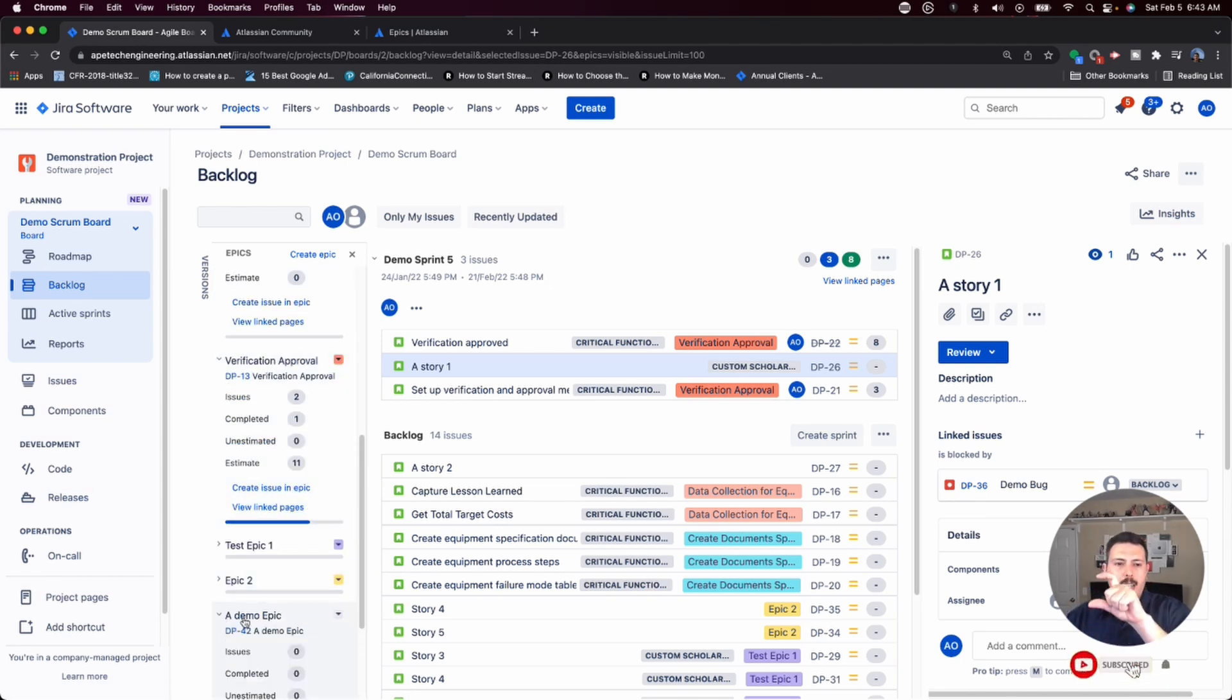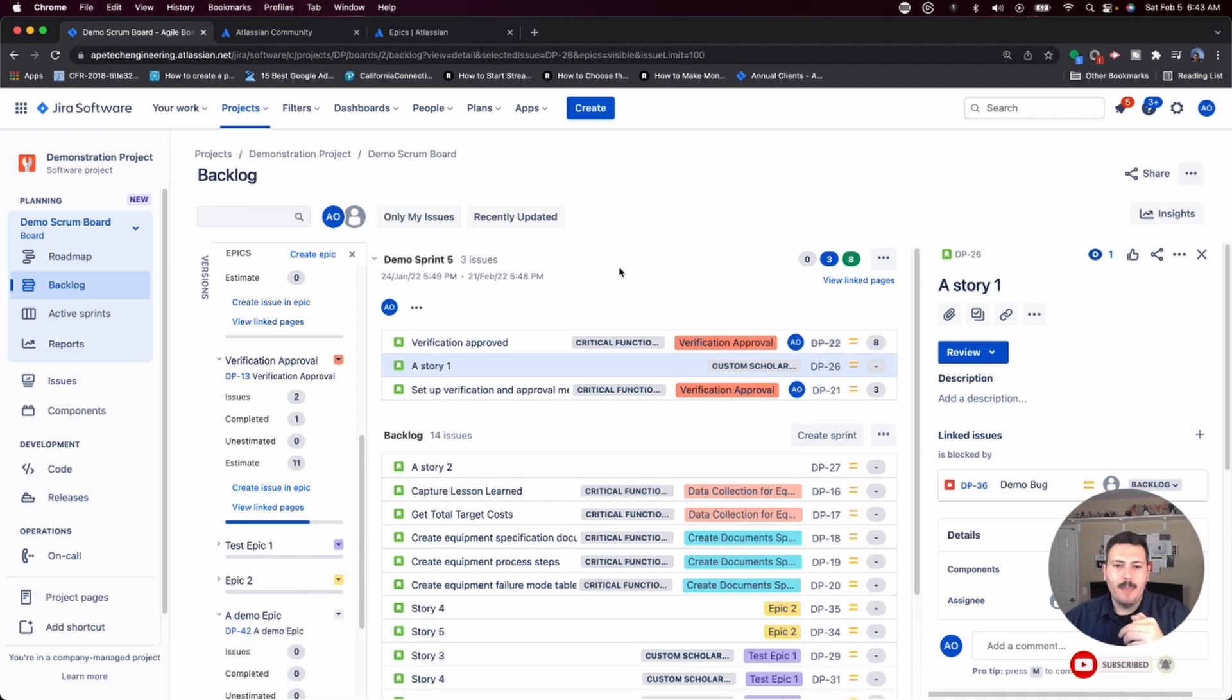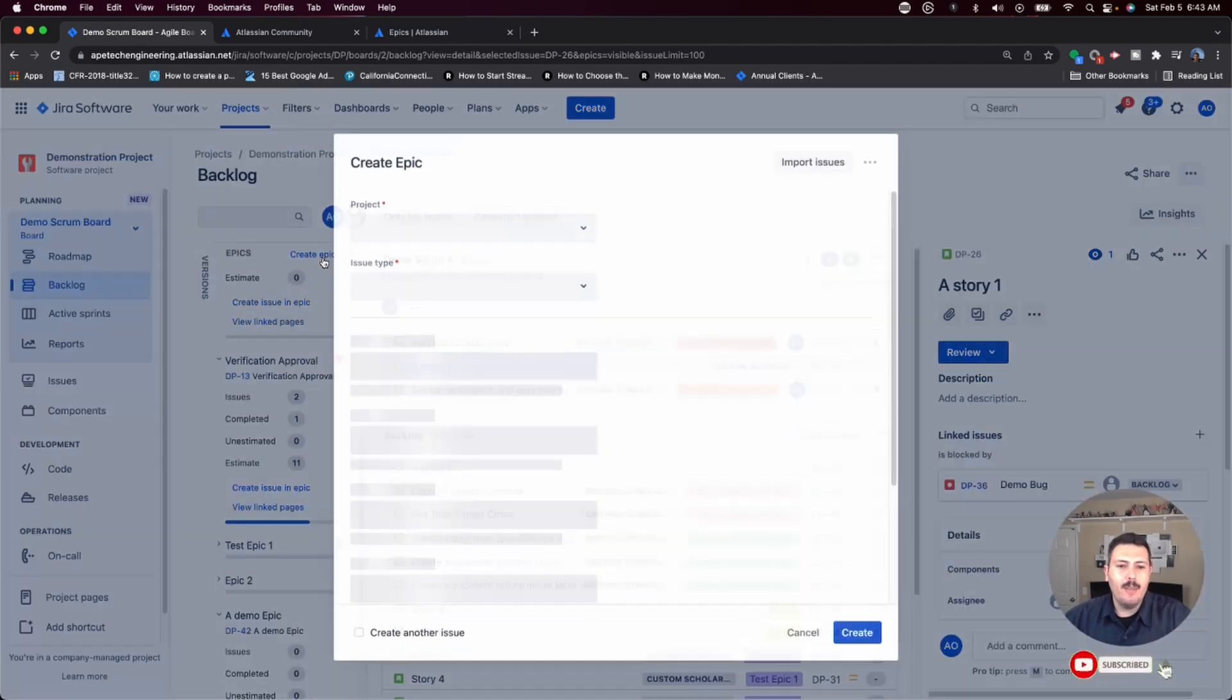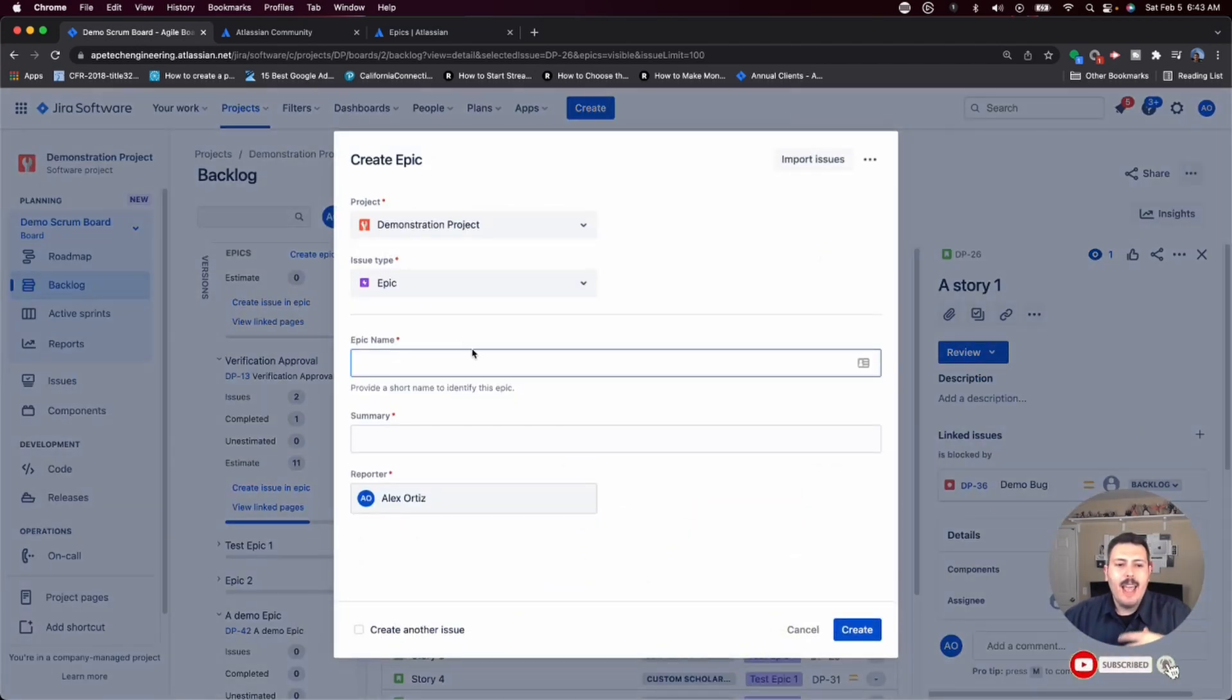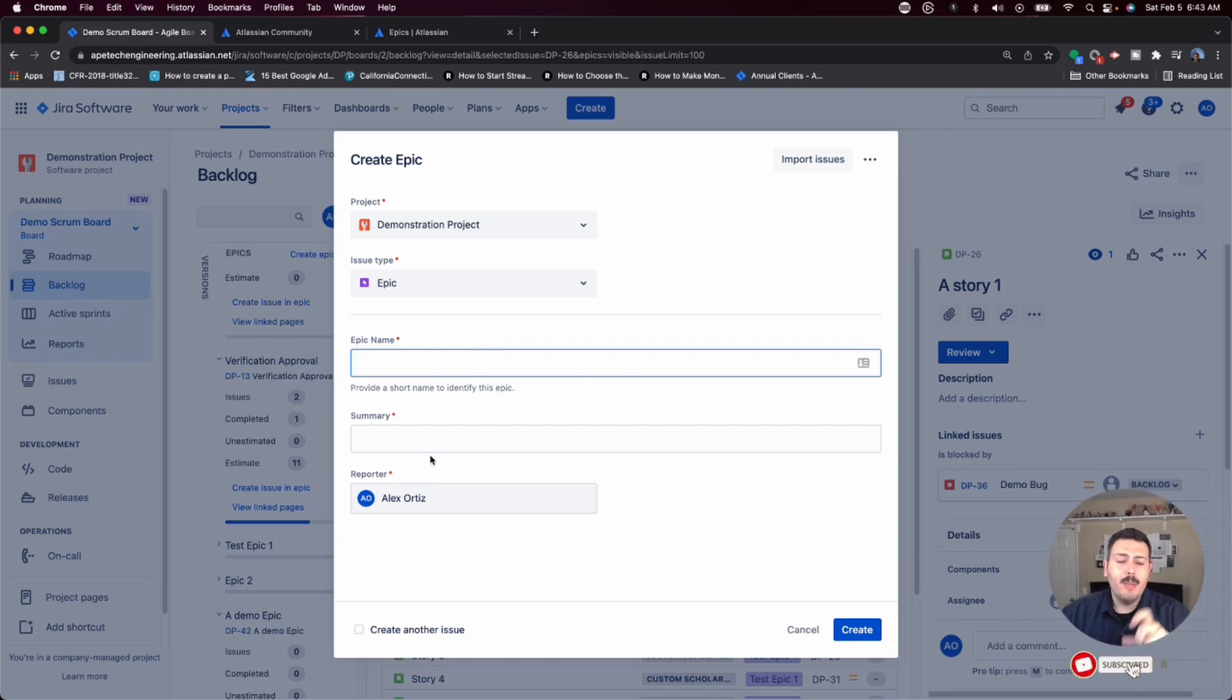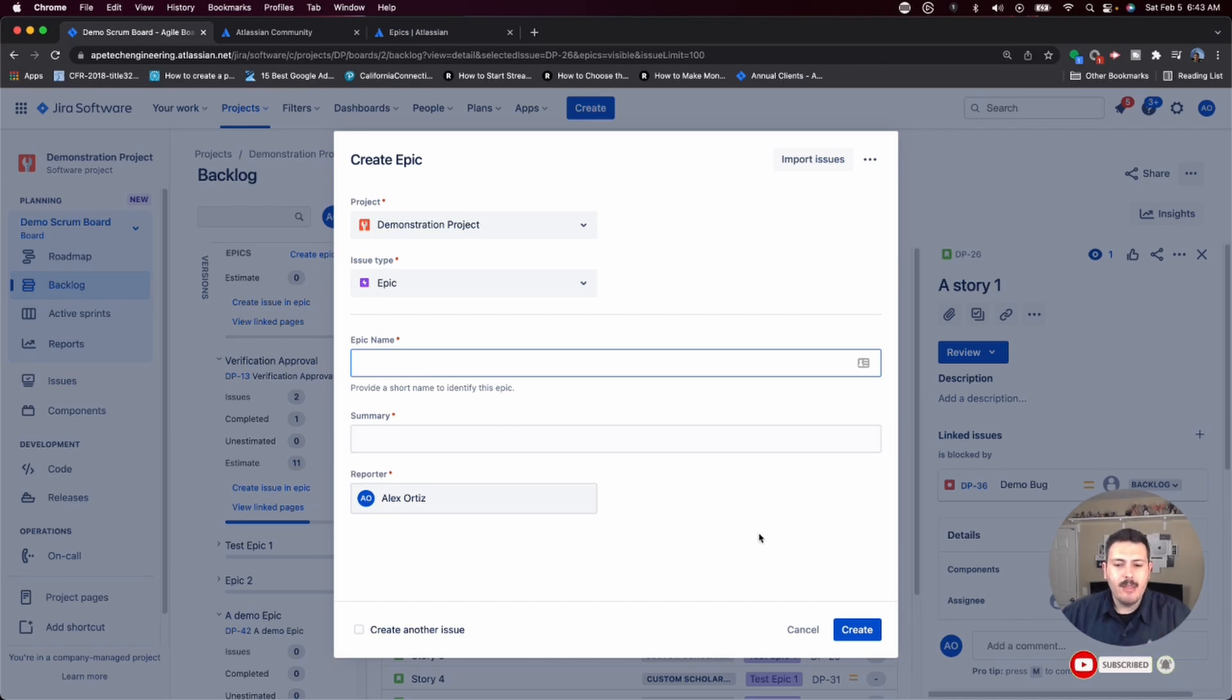And in scrum, this is how you're usually going to want to see your issues so that you can do your planning. Hitting the create button is one way of creating the epic. The second way is within this pane for the epics, you can actually hit the create button and it will basically pop up the screen. You'll notice that it's a lot more condensed. You're actually only seeing the epic name and summary because those are the only two things that are required. And so when you fill that out, it will create an epic.